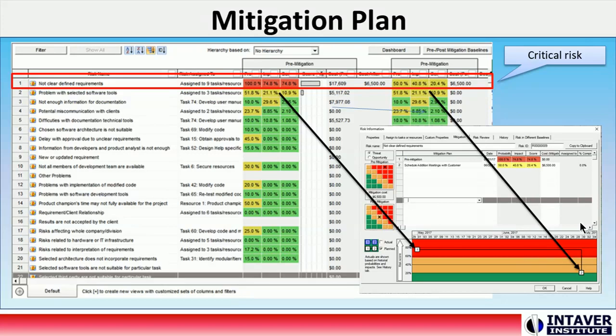However, currently this is merely a plan. In order to measure its effectiveness, we need to add the mitigation plan to the schedule.